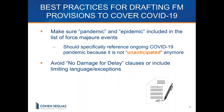For future contracts, here are best practices for dealing with the pandemic. Make sure your force majeure clause specifically includes the words 'pandemic' and 'epidemic' in the list of events alongside earthquake, hurricane, and flooding. Go one step further and specifically reference the COVID-19 pandemic — if it's not listed, the other side will argue it's not anticipated since you entered the contract while it was ongoing. Also, avoid 'no damage for delay' clauses, or if you must agree to one, limit it so that it doesn't apply to force majeure events. There are ways to limit applicability and make a more fair bargain.